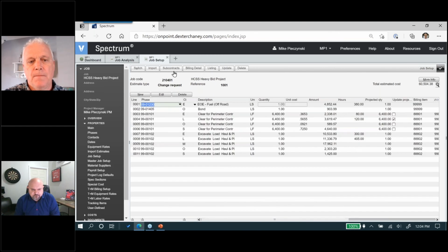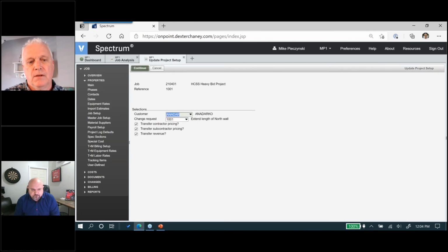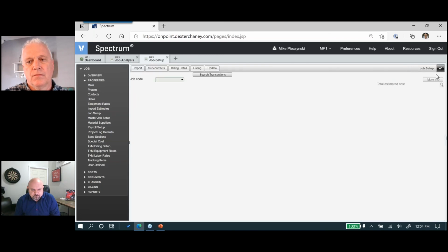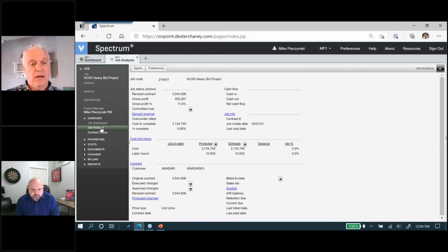I hit job setup and I hit update. I'm going to update that change request. And I hit continue here. All right, I'll check out of that screen. Let's see where we're at now. I'll refresh this job analysis that we're on, and I can see under contract control, I've got an original contract of 3.5, and here's my proposed change of 79 that we just brought in.